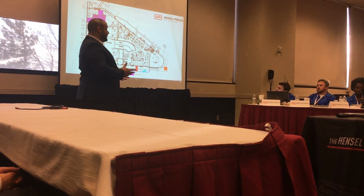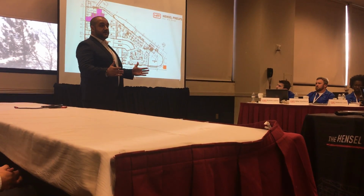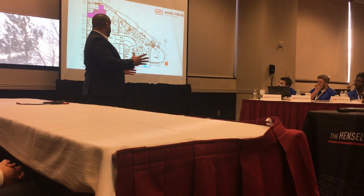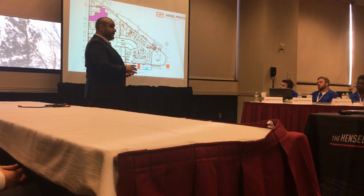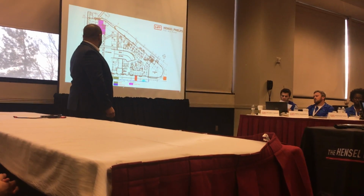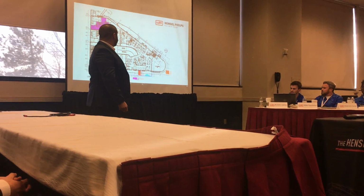And in order to get this man lift and material hoist in place, we're going to have to remove a section of the exterior precast wall. And that's going to entail cutting out the concrete, removing the glazing, keeping it, and then putting it back in later. That's going to be done on floors 2, 3, and 4. Porta potties, wash facilities, and non-unit gate are set up at the northwest corner of the property.